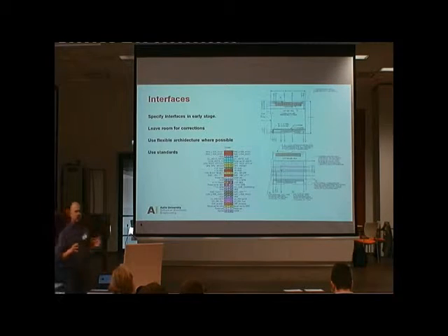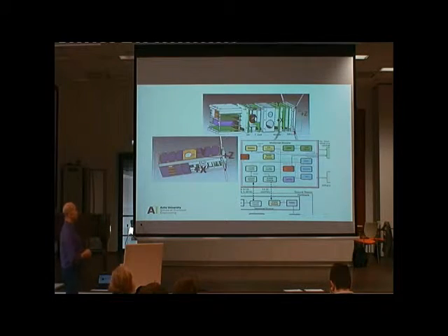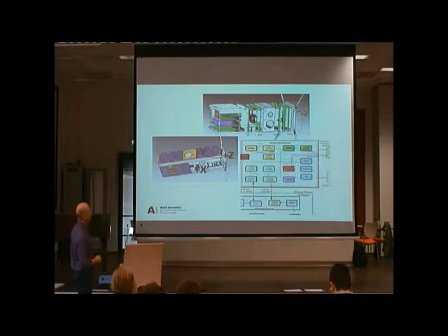And especially in the bigger projects where you have subcontractors. A subcontractor does not see anything else from your project, maybe just the interfaces. And if the interfaces are not made in a purposeful way, you can end up with a totally wrong system. They are just not fitting together. So you have to work with interfaces already in the beginning. So these are all some sort of interface drawing. You start with sketches of how these things fit together, what kind of systems you have, what kind of interfaces you have here. Work interface, I2C interface here, power lines here. So you start to draw where your interfaces are going.